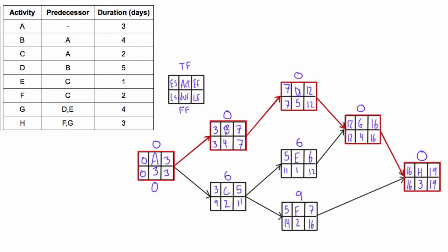For activity B, its free float would be the earliest start of its successor, 7, minus its own early start minus its own duration: 7 minus 3 minus 4, that gives us 0. Same for activity D: 12 minus 7 minus 5 gives us 0. And the free float of activity G: 16 minus 12 minus 4 gives us 0. Activity H doesn't have any successors, but its total float is 0, so its free float can't be greater than 0 — its free float is 0.